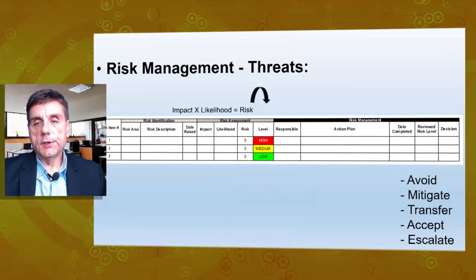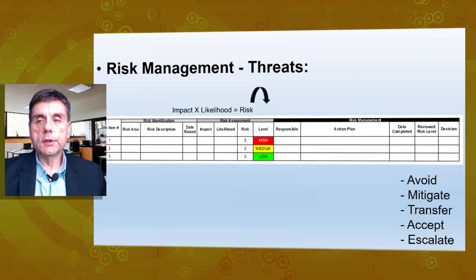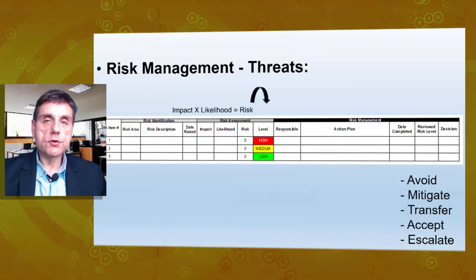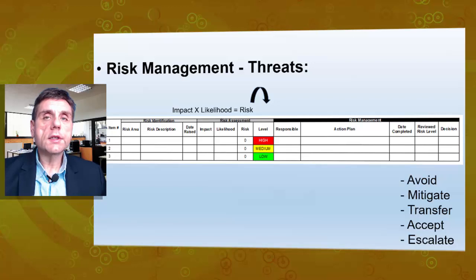Once we take action and do something about a risk, we have certain options available. We can avoid — completely stop doing something because it's too risky. We could mitigate — minimize the effect or the likelihood of the risk. We could transfer the risk by buying insurance or asking somebody to participate and help us. We could accept it if we're still willing to take the risk, or escalate if we don't have the resources to deal with it and need to bring it to a higher level of management or request additional resources.